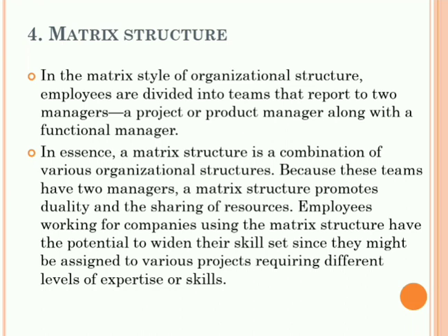This type of matrix structure is easily achieved because while the project managers exhibit project authority in a horizontal manner, the functional manager does so in a vertical manner, following downwards. For example, the project manager could be responsible for handling the project schedule or budget, while the functional manager would be responsible for outlining and distributing responsibilities, overseeing the performance of the equipment.